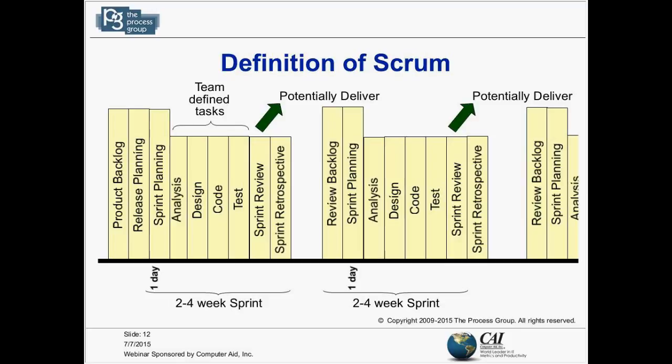into the next cycle. So if the sprint planning is on a Monday and it's a 2-week sprint, then the retrospective was on a Friday. After 2 weeks, on the following Monday, or the end of that Friday, they start to look at the backlog again, see how it changed, how priorities changed, and what new items were added, do sprint planning again to revise the next 2 weeks, and then go through the cycle.